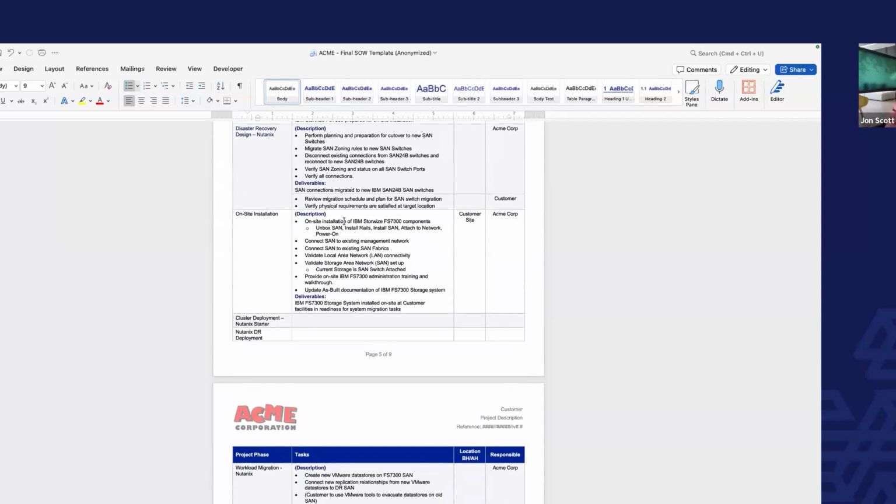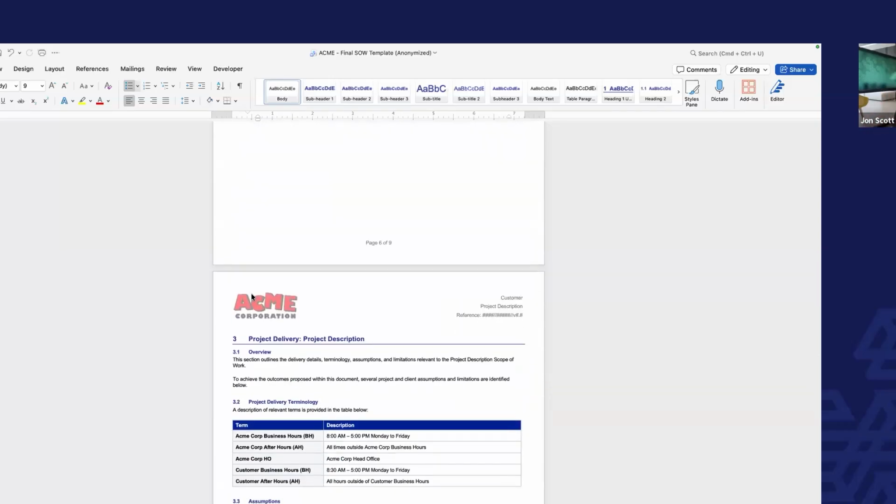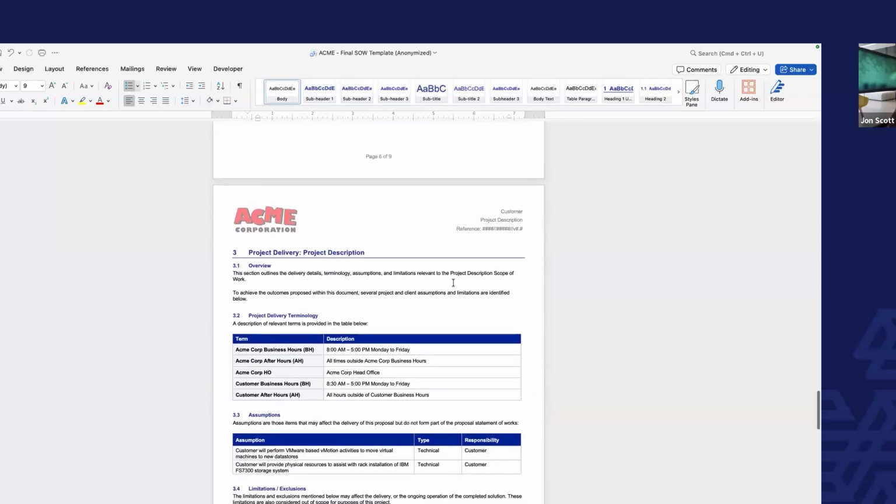As you start scoping your next project, it's automatically pulled in, right, as part of the out of scope section. So that's when it's helpful to have that kind of stuff nailed down. And that's also why it's helpful to do a post project review, talking to the engineer, right? Getting pre-sales, post-sales, and the engineer doing the work in the same room and saying, hey, what worked, what didn't work? Well, that engineer doing the work could say, hey, they keep asking us to do network upgrades and we're doing storage. Well, let's make sure we have that identified in our standard language, going from there.